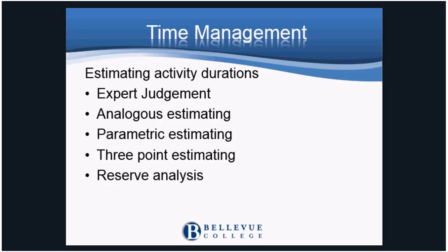Finally, the reserve estimate is used with any of the other estimating methods by adding a percentage to account for risk. The reserve or contingency that we'll review in the risk management is time or money set aside to account for variation and to put the project back on track.